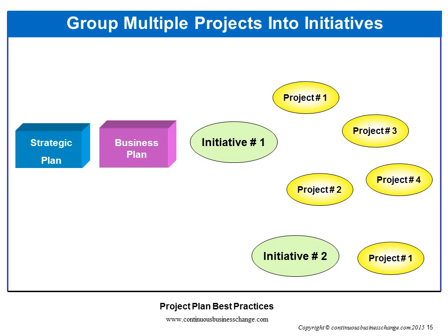They need to support the organization's goals and strategies. If this top-down flow isn't the case in your company, if it feels like you have more projects than you can possibly complete, or if you're not sure who's doing what and how all the projects fit together, then start with the projects and work it backwards. Create a list of all projects, department as well as cross-functional.